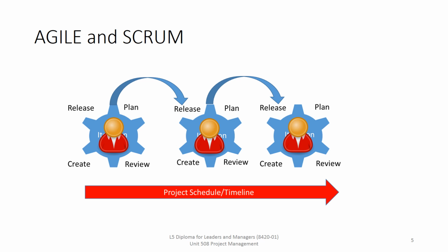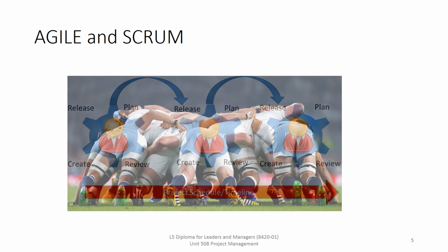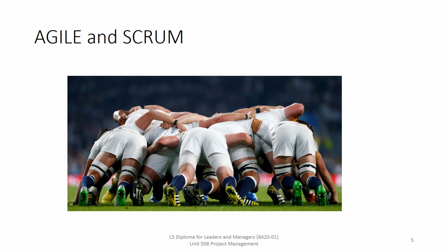And for all that to work, you really need someone to facilitate things, and that's where Scrum comes in, because Scrum is really just a framework for project management that focuses on teamwork, accountability, and an iterative process towards the overall goal, because each iteration has its own goal. So it has a role called the Scrum Master, whose responsibility is to be the facilitator of an agile team. And because the Scrum methodology allows the team to self-organize and make changes quickly in accordance with the agile principles, the Scrum Master is responsible for managing the information flow and making sure everything comes together.